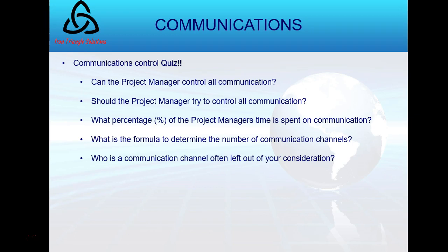Project management in predictive waterfall project management is in its nature about control, defining, detailing, and control. What percentage of the project manager's time is spent communicating? Well, common understanding is 90% of your time is spent communicating. What is the formula to determine the number of communication channels? Remember, that was n times (n minus 1) divided by 2. That was part of communications requirements analysis.